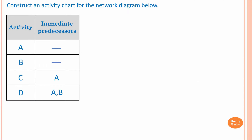Sometimes it is hard to draw a directed network, and this is one of them. The reason is that Activity C and Activity A have the same immediate predecessor — that is Activity A — but only Activity B is an immediate predecessor of D. So in order to draw this, we need a Dummy Activity.